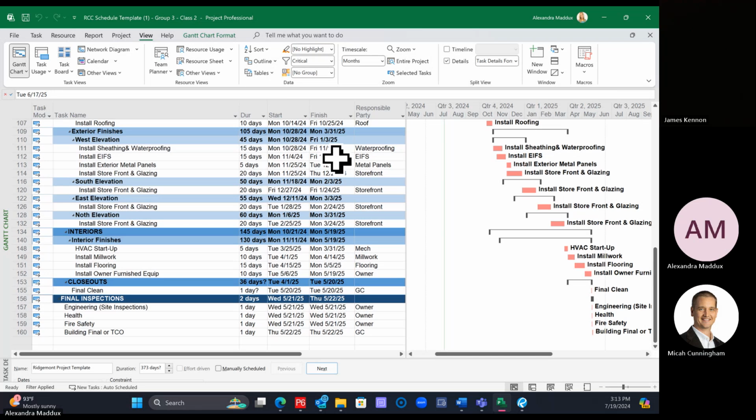Yeah. If I got a milestone date, tasks, I finish December 15th. Can I show some way where I work with... Yeah, so it'll make it so everything that's behind schedule will turn red. So not just your critical path, but everything that's behind. And yes, correct. Once the milestone pushes beyond the contractual date, you could put a constraint in there. We'll go over that next time, and show how it'll show you if you're delayed.